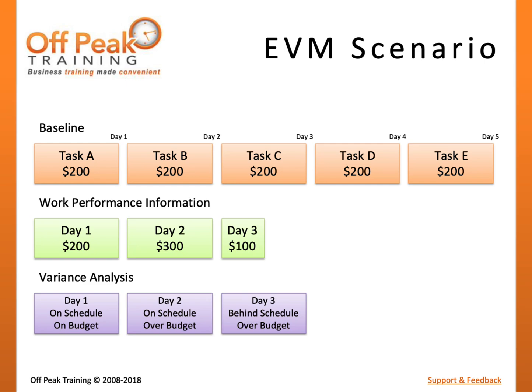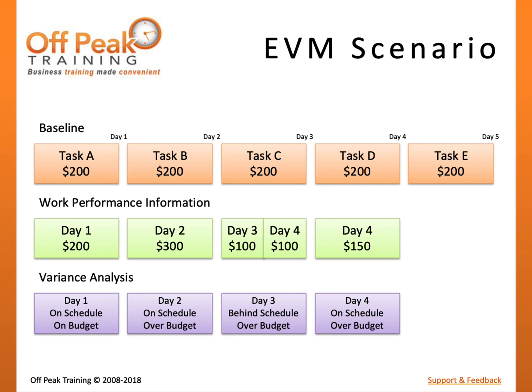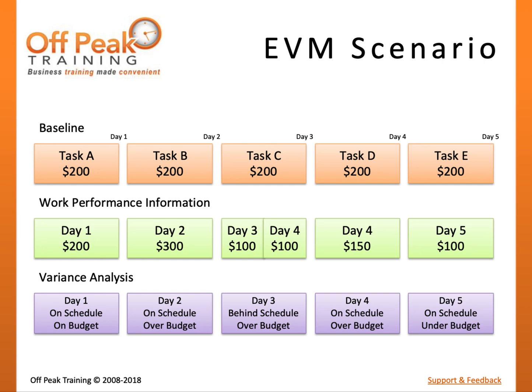On Day 4, you finish Task C and Task D and spend $150. We are now back on schedule but slightly over budget — we have spent $850 and only completed $800 worth of work. On Day 5, you finish Task E and spend $100. We have finished the project on schedule and under budget, completing $1,000 worth of work in 5 days for a total cost of $950.